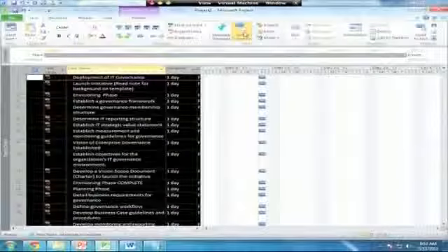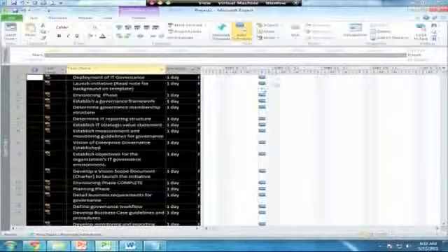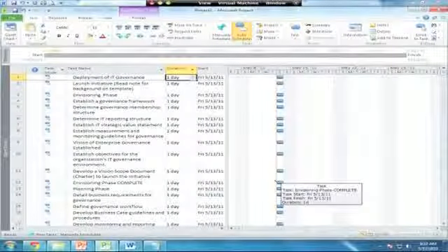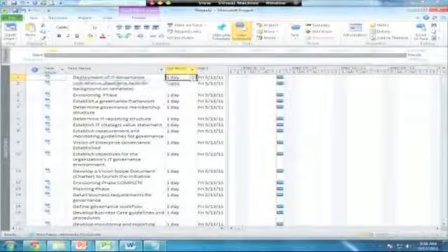Now if I highlight all of those, I can switch those over to auto schedule, and this now ties all of these tasks together. You notice that I've got a default duration set on all of them now of 1 day, and they show up on my Gantt chart as basically it looks like I've got to do all this work in 1 day, right? That's not good. So we're going to do a few things to try and tie these together.